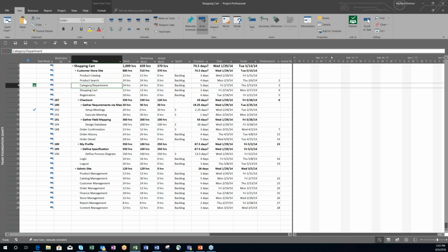Well, the project manager could create a Microsoft Planner plan, and then this is the stipulation. You have to create a Microsoft Planner plan before you link a Microsoft Project task to that plan. So you create a plan, you create some buckets that you think need to happen, you give that to your team, you say, hey, work on this. And then you would click on Link to.